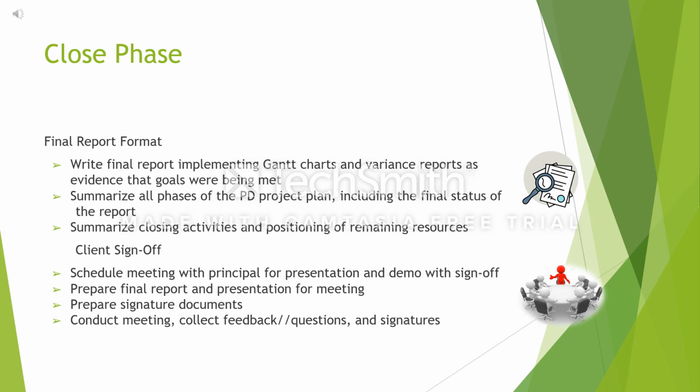During the final phase of this project, which is the close phase, in the K-12 Professional Development Project Management Plan, we will develop guidelines for closing this project. A checklist will be prepared with tasks needed to close the project, including turnover, deliverables, instructional products, and training logistics.